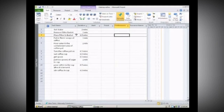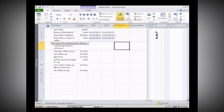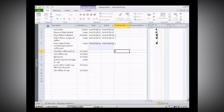Placing the filter is related to removing the filter basket, so we'd relate that activity back to number two. We would put a 2 in here. After we remove the basket and place the filter, then we'd put the coffee in the filter — we relate that back to activity three. Now we want to pour the water into the containment area — that's related to getting the water, so we put 1 here. Once we've finished with activity four and five, we can turn on the coffee pot, so we put in 4, 5.